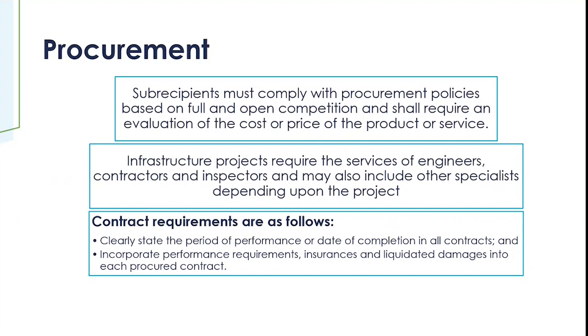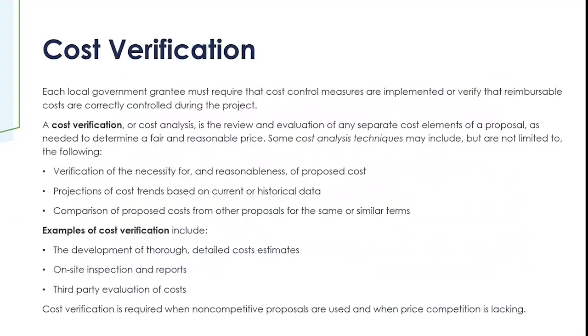Okay, infrastructure projects will generally require the services of engineers, contractors, and inspectors, and may also include other specialists depending on the project. Okay, so when entering into a contract for any of the services mentioned above, all contracts must clearly state the period of performance or date of completion, and they also must incorporate performance requirements, insurance requirements, and liquidated damages.